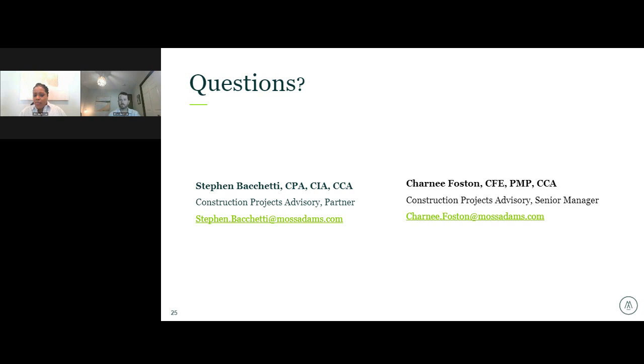So that definitely adds an element of risk to the process. Some of our clients have been surprised that GMP language allowed for contractors to increase their contract amount based on the increase in transportation costs. How do you manage that? I think one of the ways that we've seen that effectively done is by including an allowance within the contract value and having terms that the allowance is not to be exceeded. If you go above the stated allowance related to any type of escalation costs, that will be the responsibility of the contractor.